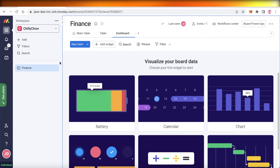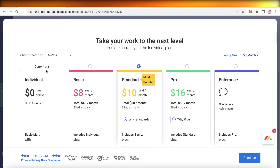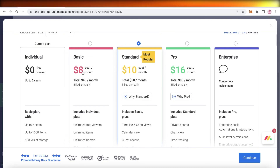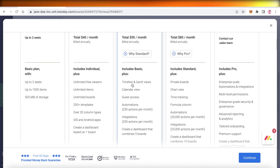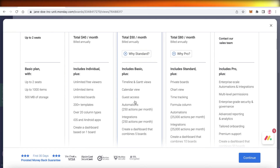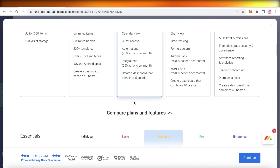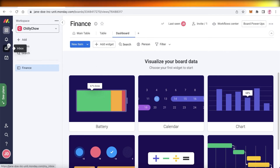In terms of pricing, monday.com is available for free, then starts at the Basic version at $8 per member per month, and the Standard version at $10 per member per month. I recommend the Standard version because it has over 250 automations and integrations, guest access for outside collaborators with limited permissions, timeline and Gantt views, and the ability to create a dashboard — a summary of up to five boards — which is especially helpful for team managers.